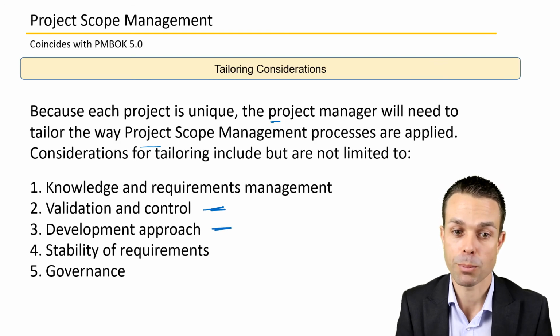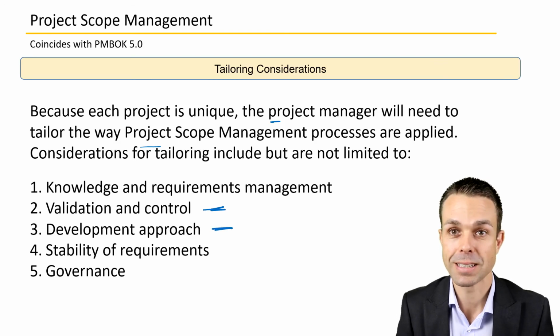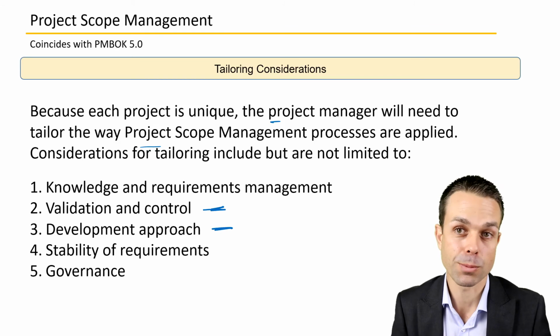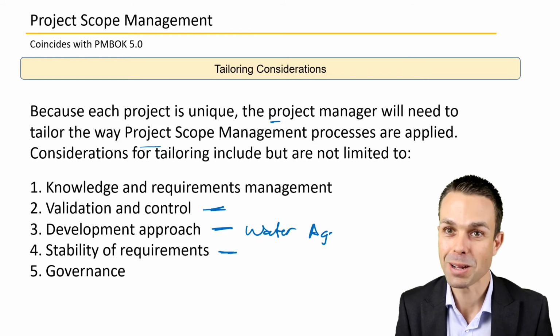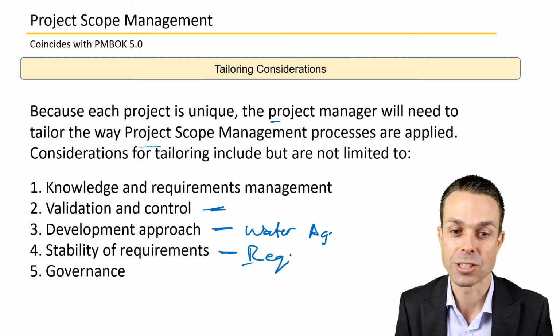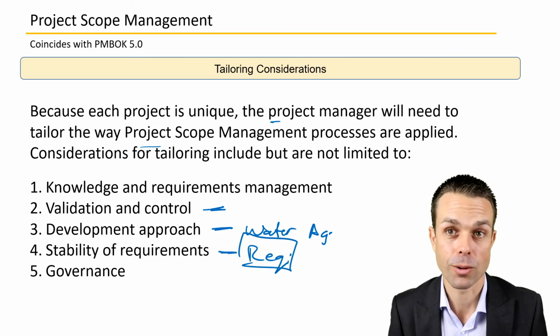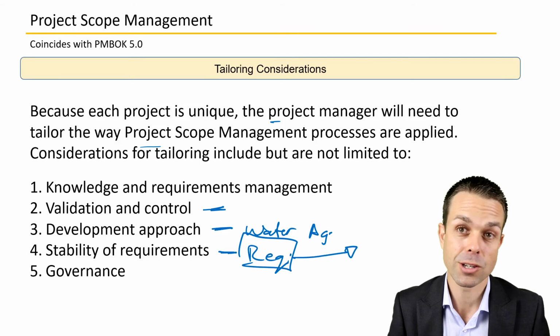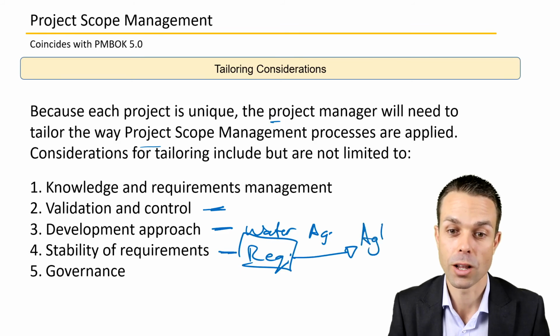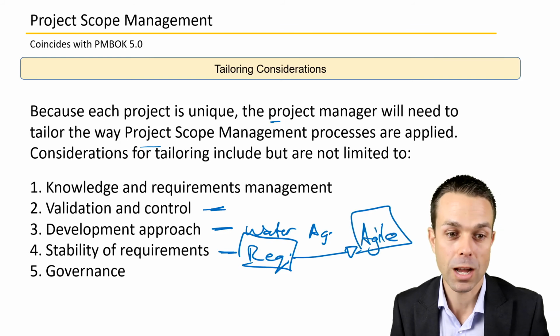The development approach. So how are we actually going to work as a project? Is it a waterfall method? Is it an agile method? The stability of the requirements. Now that's a big one. Are the requirements subject to change? Do we know if they're going to change a lot, or do we have an indication of that? Maybe if it is going to change a lot, it's better to use an agile approach, which is much better in the face of changing requirements.